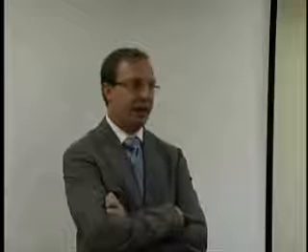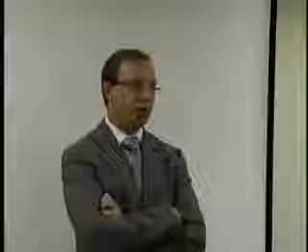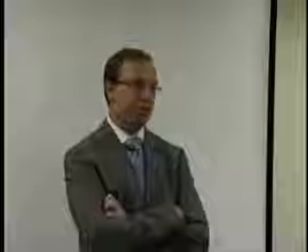Let's assume that your contract says that all change orders have to be signed in writing. First of all, I tell all contractors, and we're going to be getting to that later on, take out those written change order requirements. They only hurt you guys. They don't help you, because it's always the owner that says, oh, you didn't get it in writing. Ha ha, you can't charge me for it. You did it of your own volition because you're just a nice guy, and I never told you to do it. And if you think you're going to charge me for that, you're not, because ha ha, look at your contract that you drafted. Well, that's why I say take them out. Take out those written change order requirements.